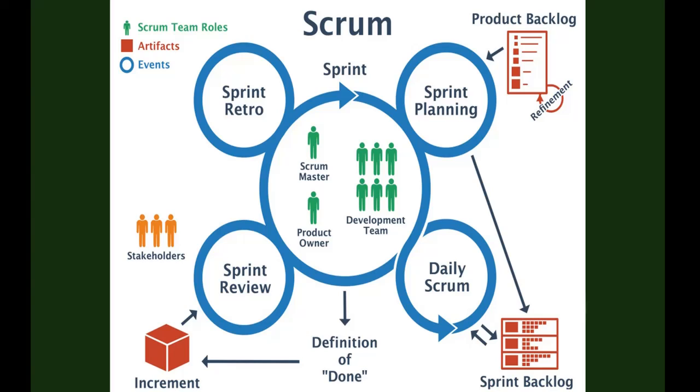But if the documentation is one of the acceptance criteria, what should the Scrum Master include in here? So if the documentation is an acceptance criteria, he will put it in the definition of done list. So definition of done means you make the deliverables, and after that you have to make the documentation. And if this is done, then you can say okay, this is done. Pass, something like that.